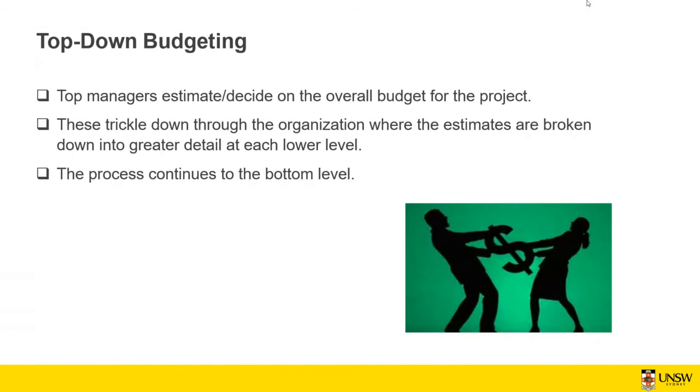So what you do next, then, is specify how much of that budget goes, for example, to renovating a kitchen, how much goes to renovating the toilets, and how much goes to landscaping and gardening. So as the manager, as the owner, you decide how much budget you want to spend on this project and how it's going to be broken into different tasks.